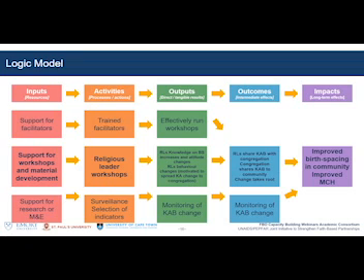And I think there's something about logic models being really important as a tool to negotiate with funders and to manage funders' expectations. It's true that many funders have their eye on the population-scale long-term impact. But it's really important that program and implementation staff have a strong enough understanding of the logic to be able to push back on funders, saying things like, you will not see birth spacing change within 6 months of this workshop being run.